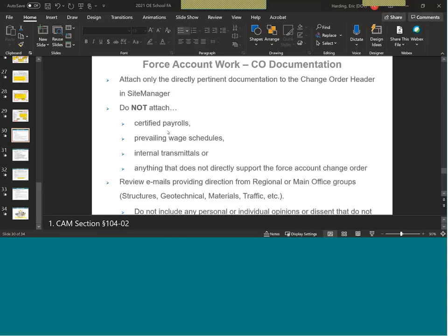And a question was asked about services. Is it 10 days or is it based off of hours? Say that a service is on site 1 hour a day. Are they still held to 10 days and therefore 10 hours, or can they be there for up to 80 hours? Now the spec says work services are limited to 10 work days, and it only defines work days as a calendar day that the state does not consider a holiday. So again, that would be a case-by-case basis as to what your service actually is, and you'd have to discuss it with your regional change order specialist.